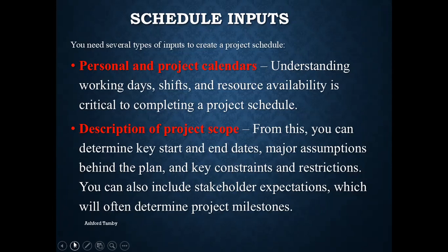What would you do? You have to ensure now that you adjust your schedule. If you are working with an unlimited budget, well then sure, work on the 2nd of May and tell your workers to come out. However, we know that often we don't work with infinite budgets. So you have enough time now to make adjustments to your schedule to ensure that the workers know that on the 2nd of May they don't have to come out to work. Your stakeholders know that you will not be working on the 2nd of May.